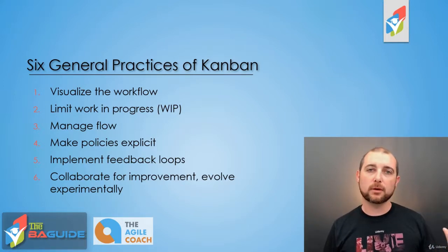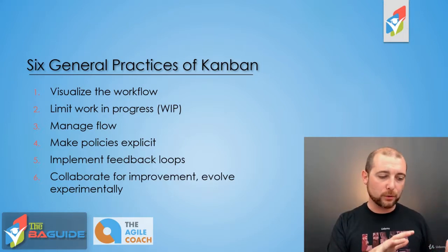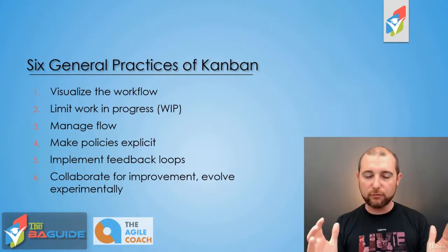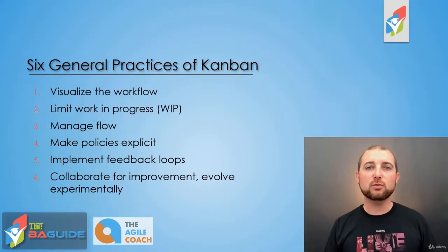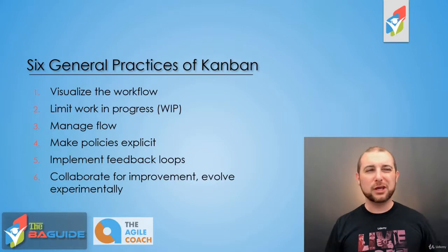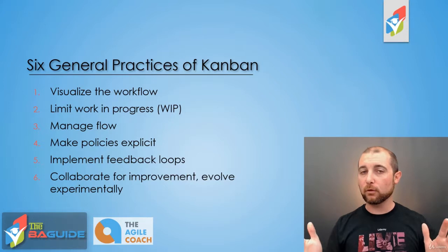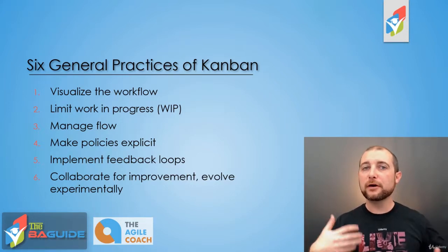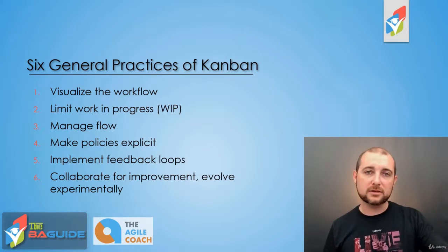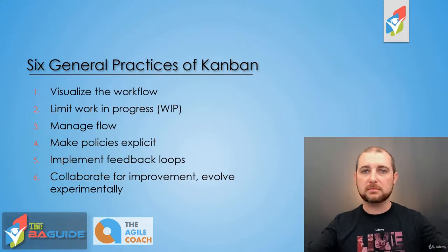So if we think back to Scrum, it has sprints or time boxes in which you're going through and you're completing a set of work, and then at the end of that sprint, you're able to look back and say, how did we do? Are there changes we need to make as a team? And anything like that. Well, with Kanban, you really don't have set sprints. I mean, you may have some structure set up there for the organization if that's what the organization likes, but it's not really necessary. This can be a fluid type of process. Things are always added to the to-dos, and they're moved throughout the various statuses based on where that work item is, and you just keep moving.